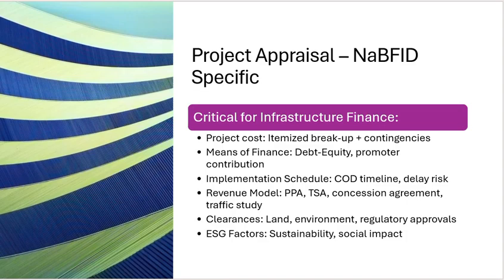the project appraisal from a NaBFID-specific perspective. So what is the project appraisal? We are going to discuss what is critical for infrastructure finance. So the project cost, itemized breakup and the contingencies. We check all the contingencies and the itemized breakup. We focus on the fixed term contract or the fixed price contract, because that way the risks are transferred to the EPC contractor and the operation and maintenance contractor, to give the loan against the fixed price contract.